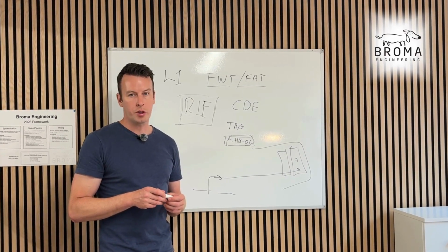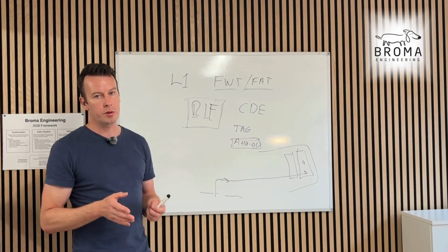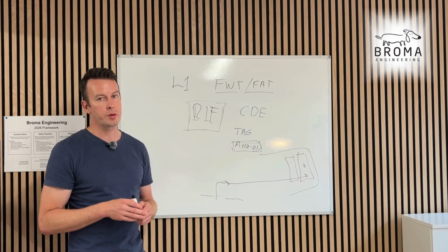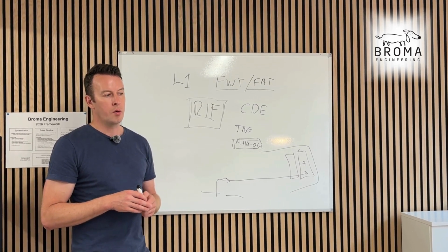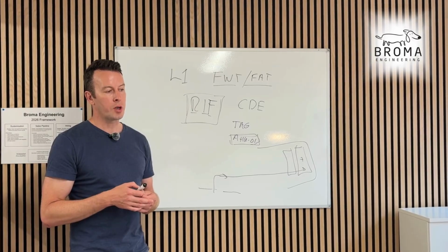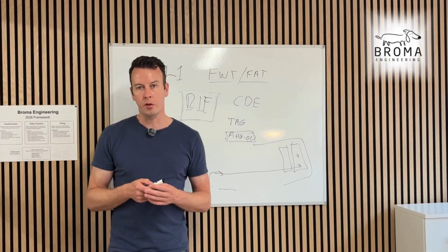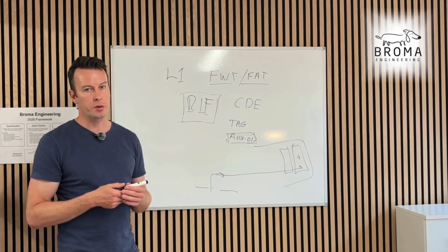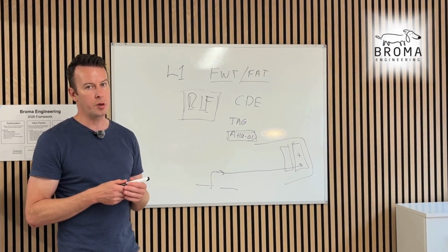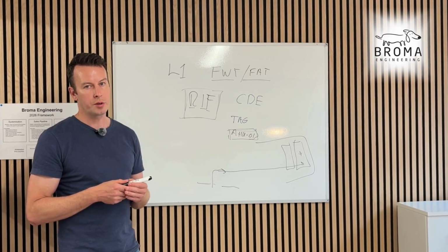Sometimes the vendor does it, but make sure that you know exactly what everyone's doing well before this equipment arrives on site. When you're doing your OFCI meetings, make sure your OFCI manager or yourself knows all this, that there's no scope gaps, that there's no argument the day before, the night before, the day of, slowing things down, holding things up.